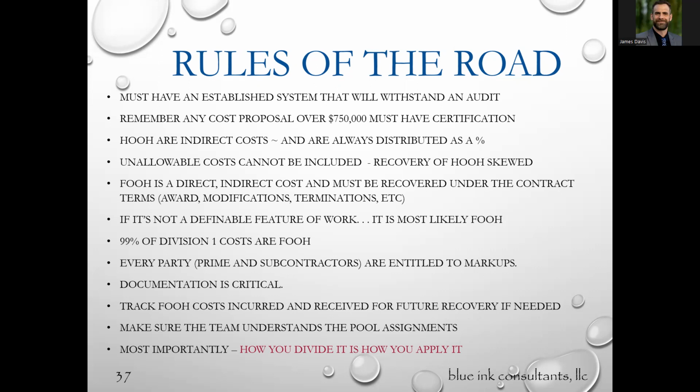So you have to sign a certification over what we call a certificate of current cost and pricing data, which means my cost accounting system is set up. All these costs are accurate. All of these can be accounted for, and I can substantiate all of these costs. They're looking for basically a signature that says it's truthful to the best of my knowledge, and that I have no evidence of fraud. Okay, and I will get you those numbers here really quickly.